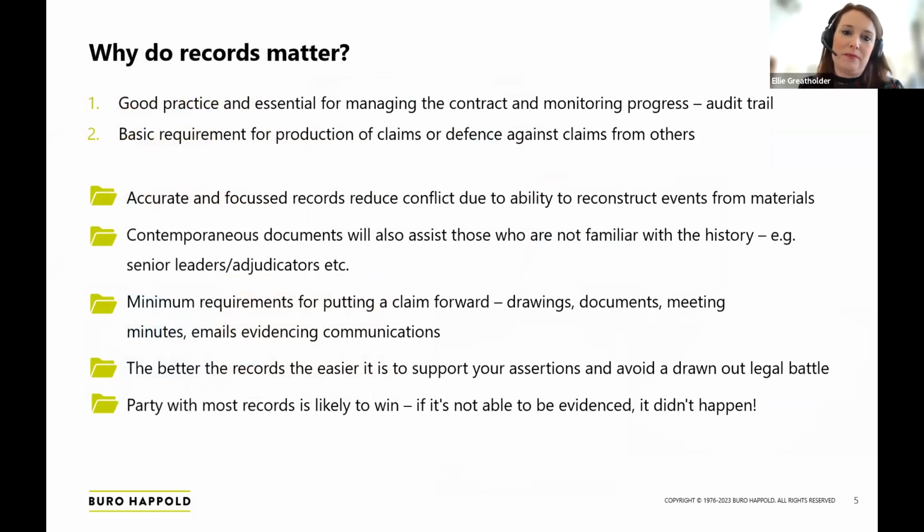And why do they matter? So the first thing I want to say before we get into the bits around disputes and claims is just that having good records is an absolute prerequisite for a good, well-managed construction project. It's good practice, and it's really important for managing a contract and for monitoring progress. It provides an audit trail of what's happened when. It's proof that you've undertaken what you were supposed to undertake. And we'll come on to it in a minute, it is also required contractually in a number of cases.